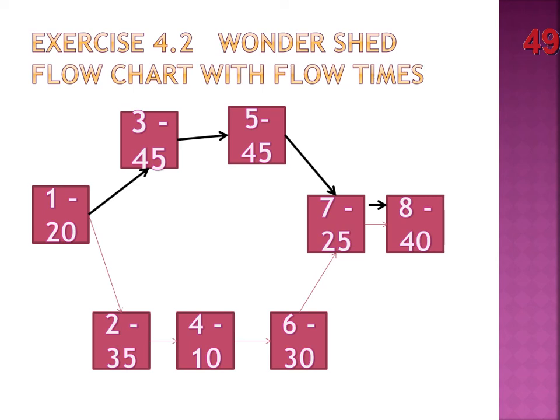So I want to determine the flow time. What's the process I use to figure the flow time out? The total. Add up both paths. Yeah. And then which do I select, the longer or the shorter? The longer. The longer, right?